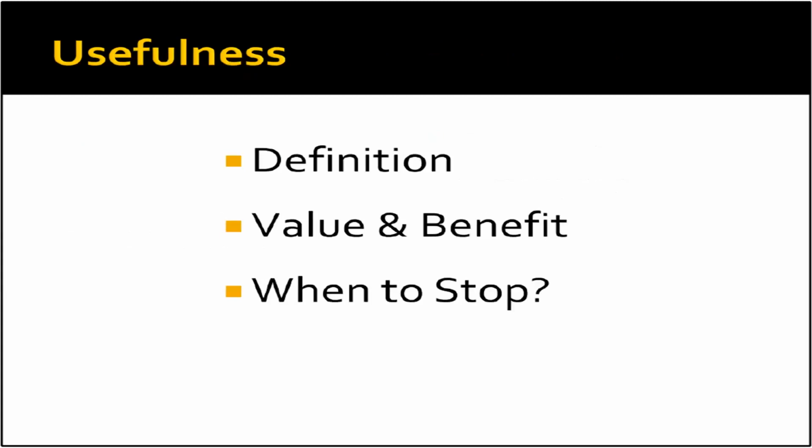As you complete a project and look at defining what will be tracked and when, you need to also consider the useful life of the outcome measure. How often have you continued to report on a measure that no longer has meaning because no one ever actually decided the continuance of the measure was not useful? Understanding when compliance or success is reached and is considered sustainable is a key part of tracking outcome measures.